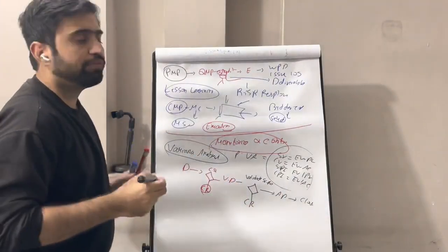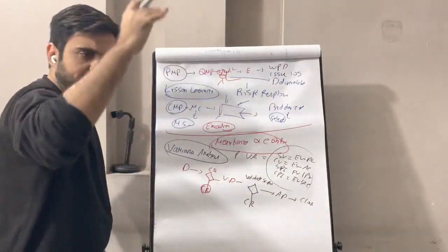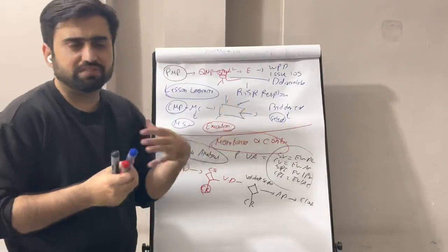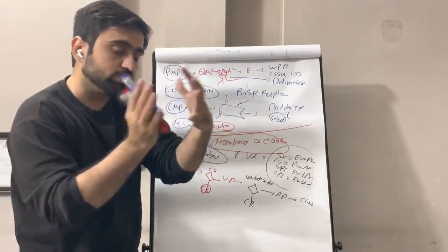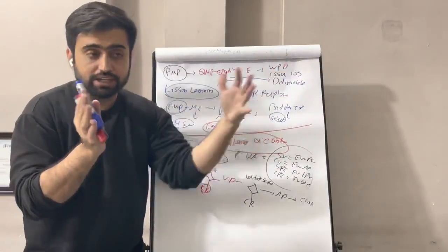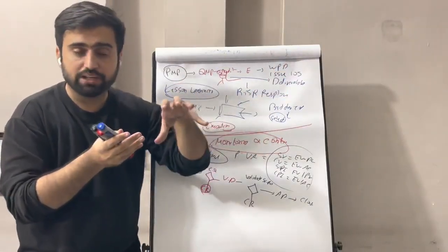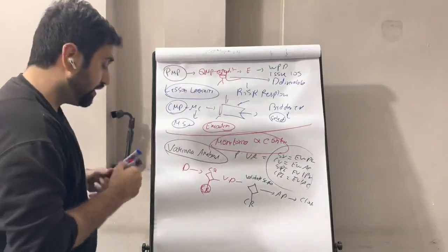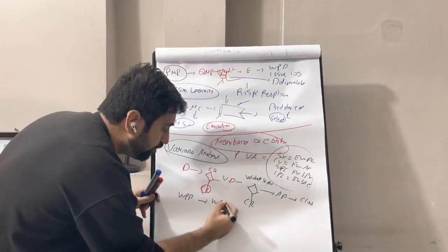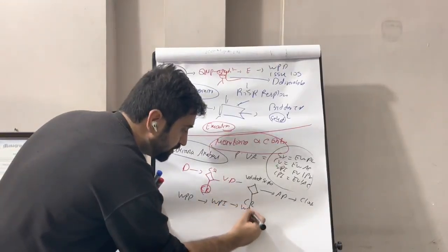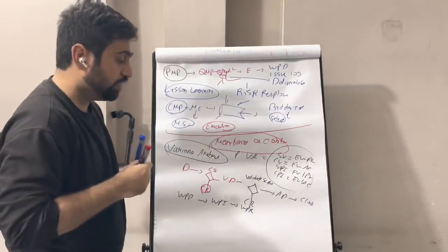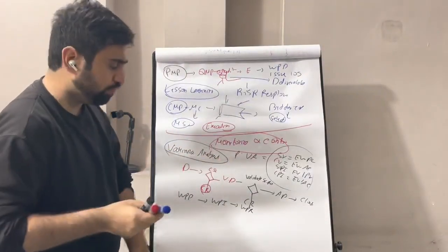All the work performance data produced from all the areas is raw information, without any understanding. It goes to all the departments, scope, schedule, cost. Each department gets that data and compares it with their own plan, and the data gets produced into work performance information, which gets produced into a work performance report. Data gets converted into information, and information gets converted into a report. So, two very important journeys.